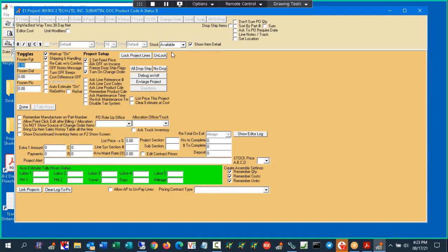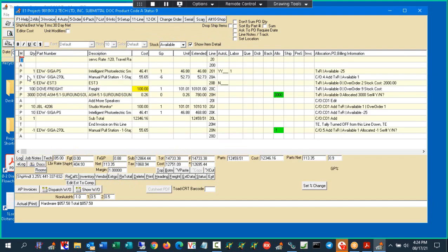Well, Tony, you said earlier that if you add the change order module and then you activate the security, it'll lock the project. Yeah, exactly right. All we have to do is enable several security points, or in fact, disable security points for everybody that shouldn't have it, and minimize who can approve a change order. So Craig can approve a change order. Administrative, high-level administration can approve a change order. But it's not the PMs. It's not the salespeople. It's somebody that's going to take responsibility to check to see that the parts are being returned to the project. That's it.